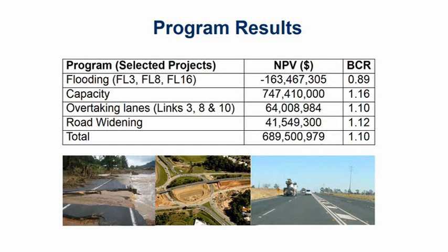My paper actually goes into a lot more detail in regards to the results of individual projects and how they compare. And you'll find that a large majority of the projects actually get benefit cost ratios below 1. So it's some of them that are scoring very, very high that are pulling the whole program up. But in retrospect, you'd go back and think that you'd take out some of these very poorly performing projects from the program, simply because they're pulling it down. It's not a very good use of the taxpayers' money, considering the benefits you're getting. It's more directed at improving freight times, so you can see industry is actually benefiting more than the majority of Queensland taxpayers for a lot of those.